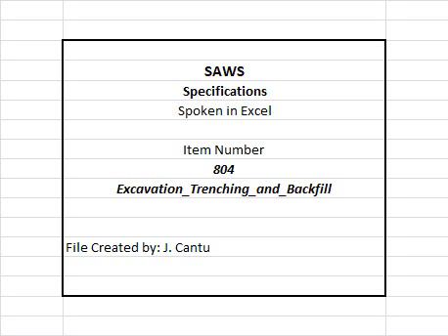804.8 Measurement. Excavation, trenching, and backfill will not be measured for payment. 804.9 Payment. No direct payment shall be made for incidental costs associated with quality control testing, excavation, trenching, backfilling for water mains and sanitary sewers, and placement of all-weather material, and all costs in connection therewith shall be included in the applicable contract price for the item to which the work pertains.